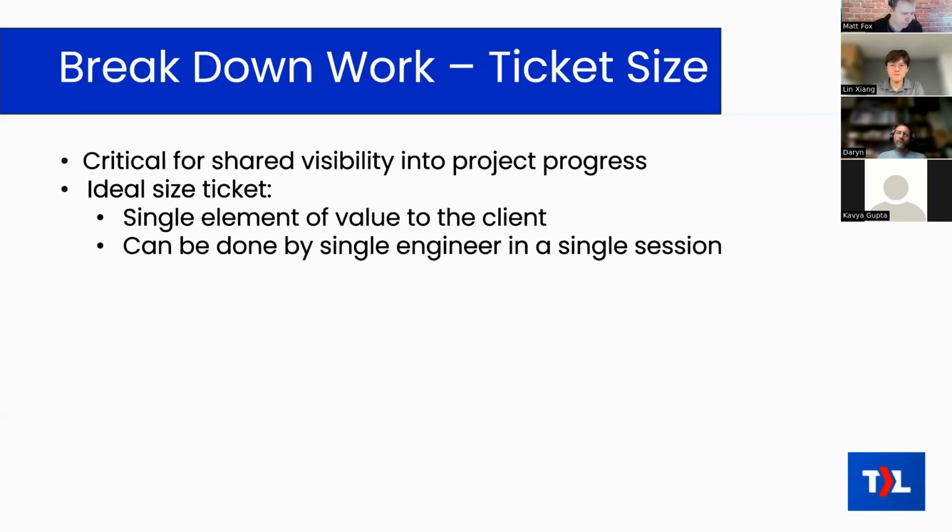As an example, let's suppose that you're doing a firewall migration project. One ticket could be to do the configuration of that firewall in your office before you deploy it. Okay, so that when you take it on site, it's ready to deploy. It wouldn't be the entire firewall migration in a single ticket.